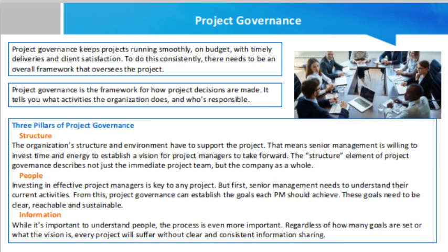The project owner retains control of the business case and budget, so the model should include a portfolio board, which approves the release of funds, a project board, which gives approval for key documents, a project manager, responsible for day-to-day decisions that do not impact the business case. And finally, there is the project team who deliver the project as per the vision set out for them. With a strong, robust project governance model in place, the overall framework of the project should maximize success.